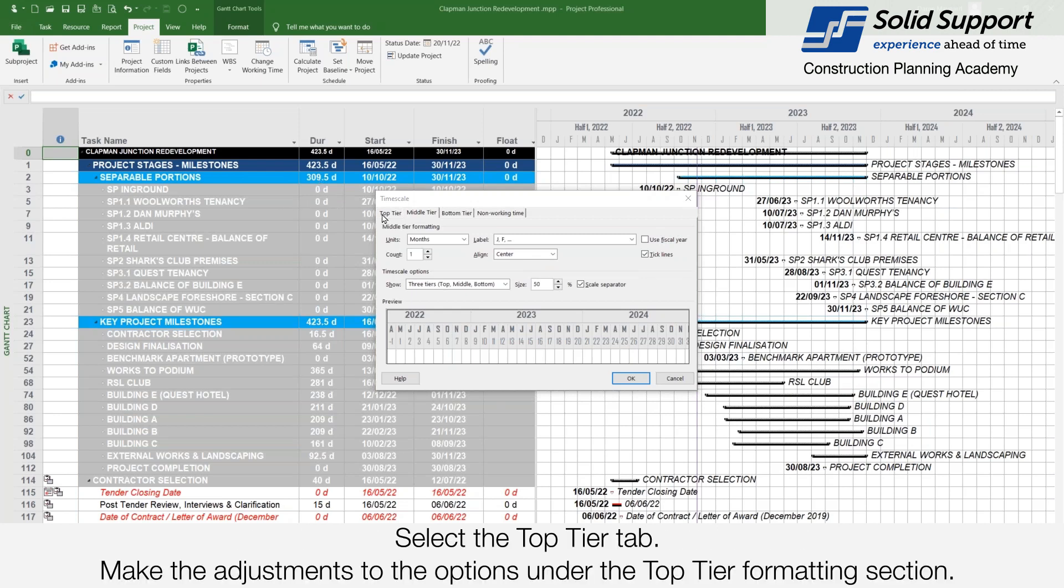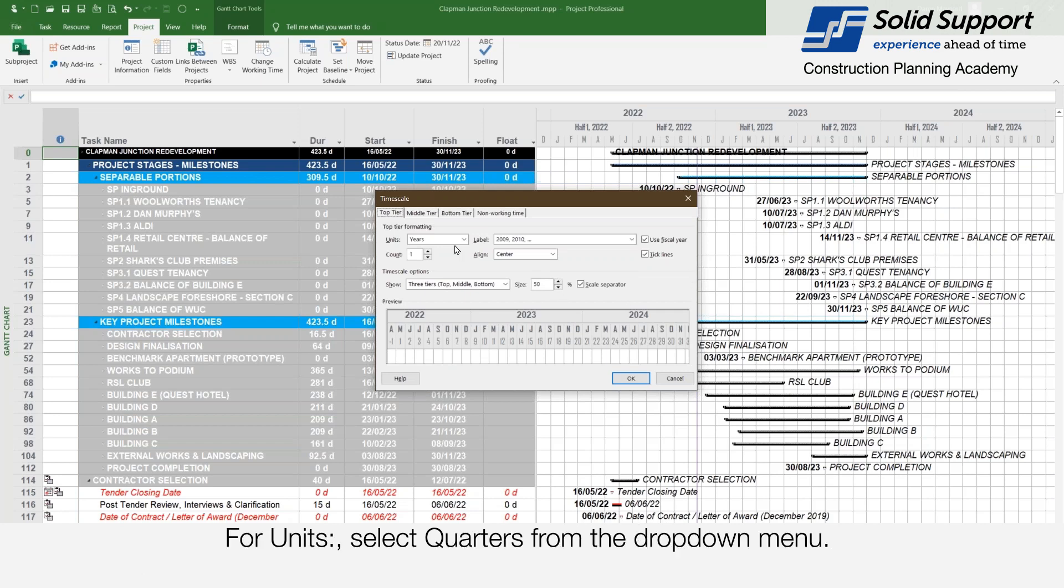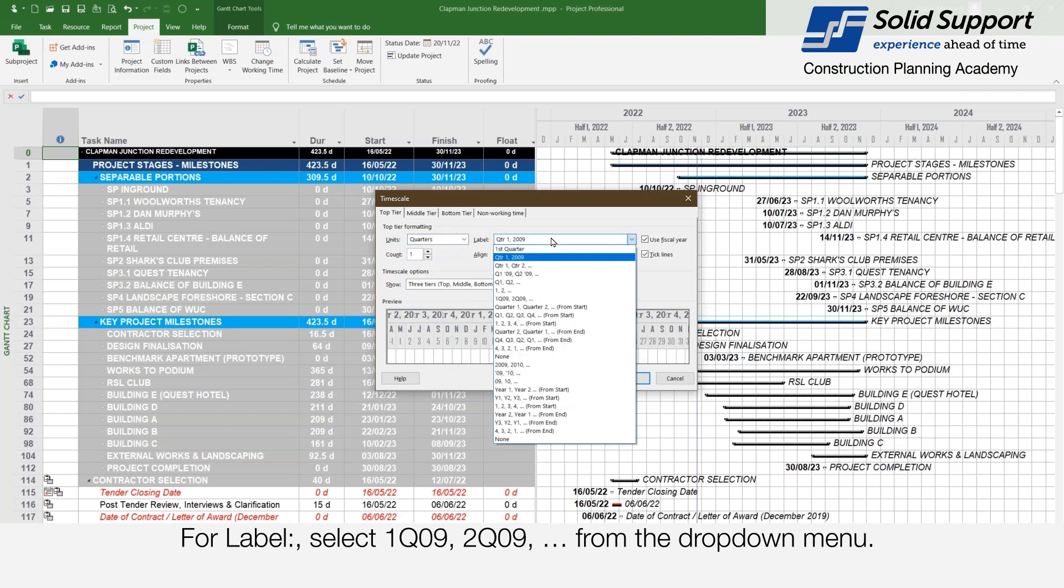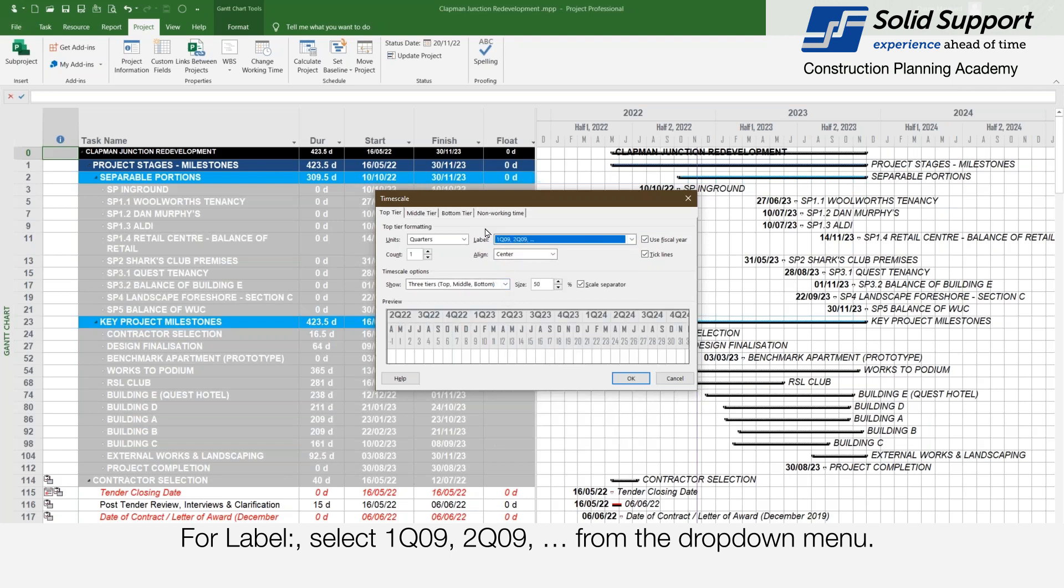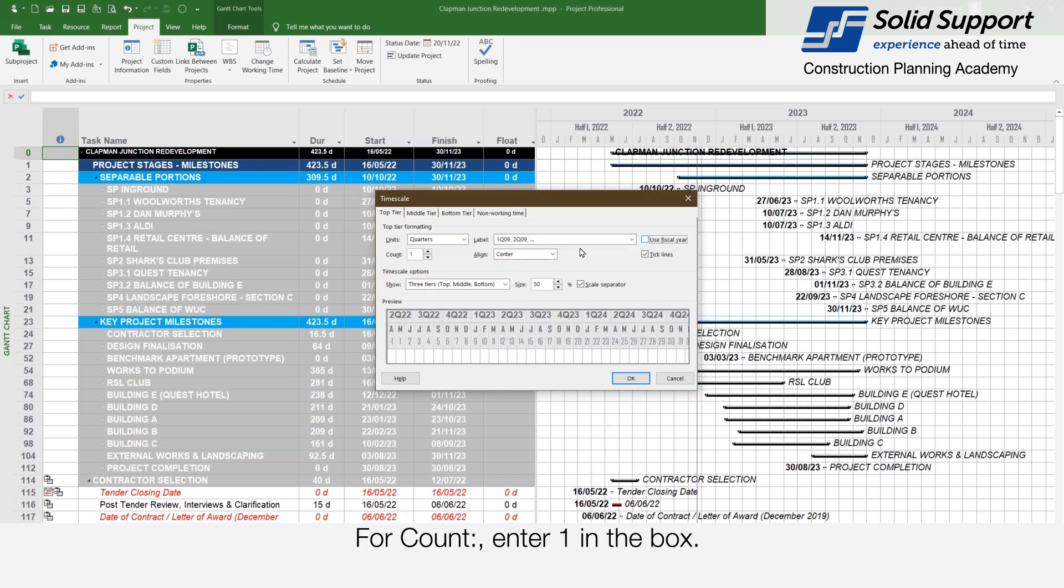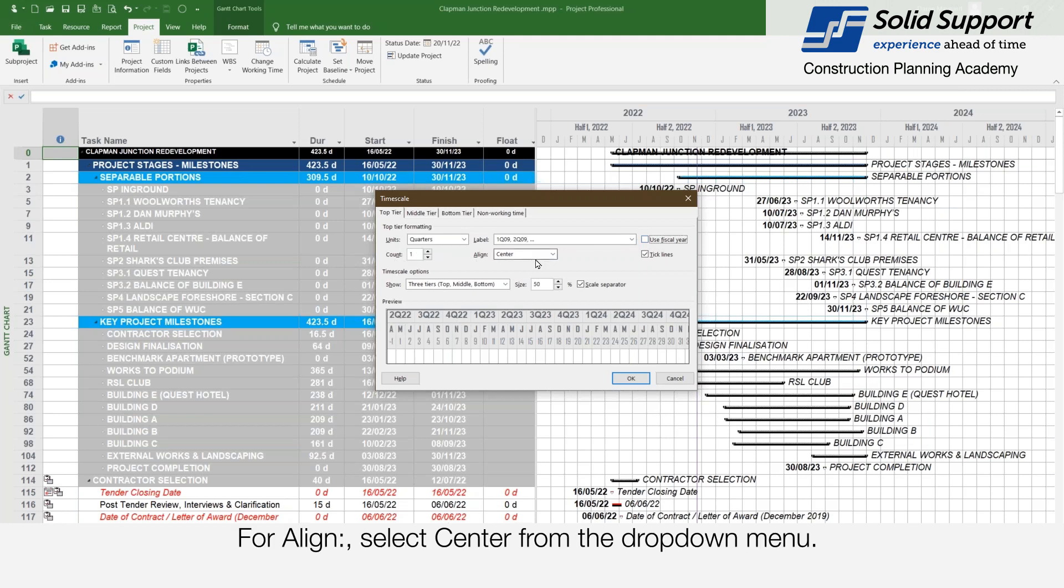Select the top tier tab. Make adjustments to the options under the top tier formatting section. For units select quarters from the drop down menu. For labels select 1Q09, 2Q09... from the drop down menu. For use fiscal year you can untick the box. For count enter 1. For align select center from the drop down menu.